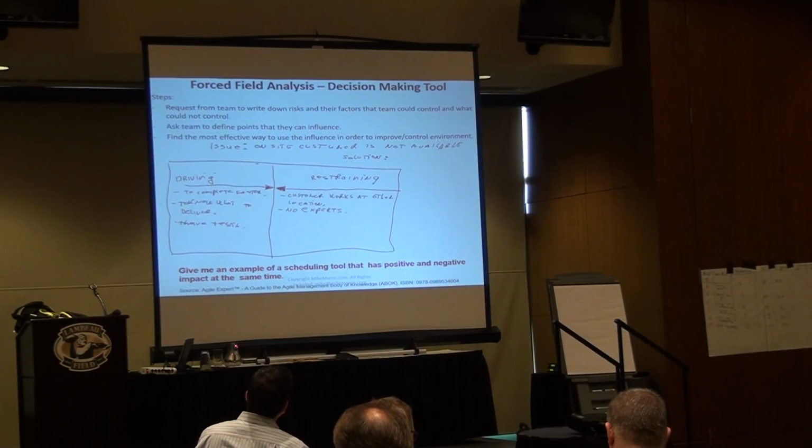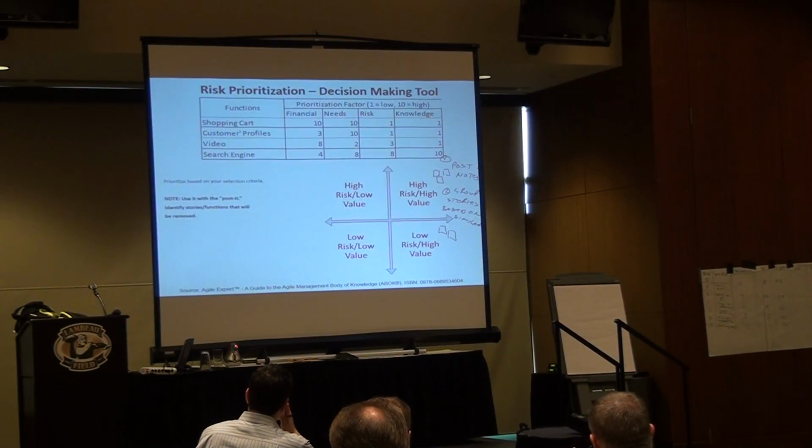Why? Because the engineering base is East and Midwest. California is more like a socializing kind of place. And I'm talking about a mechanical engineer, not a software engineer. So you see, it's a constraint that you have to understand to solve the problem. We are failing to deliver the mechanical solution on our project because we have limited access to resources within the job market. So we have to ship somebody from the East Coast to the West Coast. And you can just think about changing home pricing or whatever, relocation fees, etc.